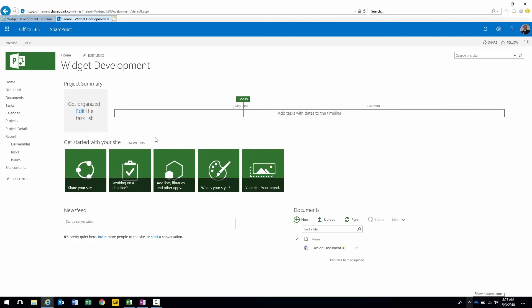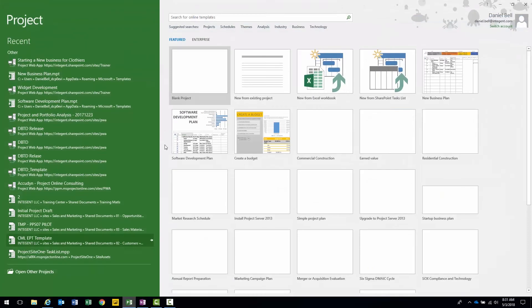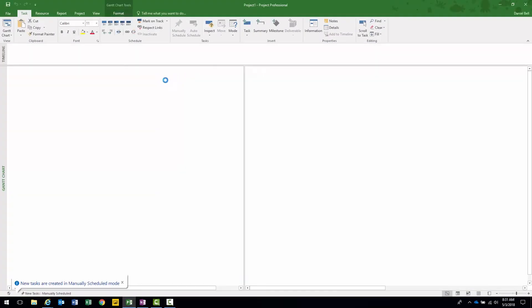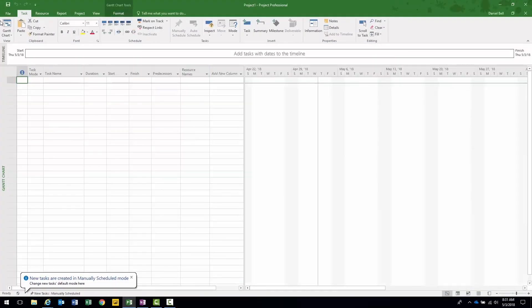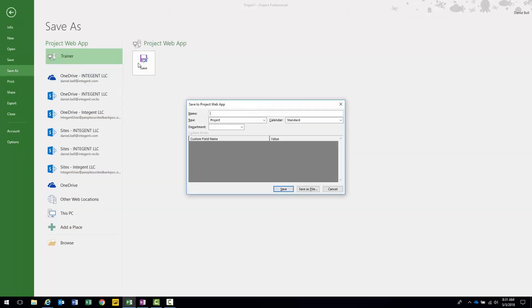In the next lesson we're going to talk about actually customizing that project site template and then saving it as a project site template. This is lesson two. We are going to customize a project site template and then save it as a template to be utilized for all our project sites moving forward. First thing we need to do is actually create a project site from which to make our modifications. I like to do it by creating a project site from a project publishing process. Let's create a project. I'm going to create one from a blank project. I'm just going to call it Template. Click save.